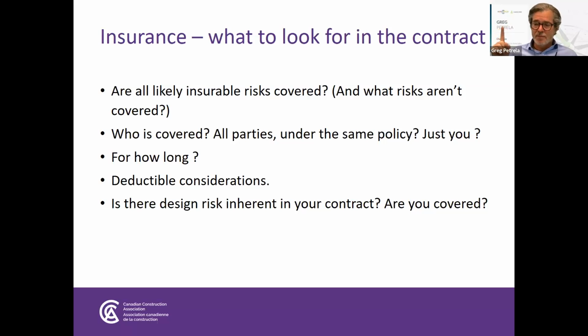And it's usually going to be the party who was responsible for the damage. So that's probably going to be your roofing contractor or your plumbing contractor, whomever, or whoever drilled the hole in the pipe. And so they're going to be responsible for that deductible. On a wrap-up policy, the subcontractor can build into their own annual policy coverage for those deductibles up to a certain amount, maybe up to 50,000, maybe up to 100,000.